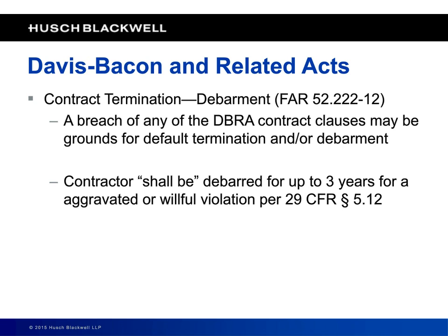Now, that got appealed to the Sixth Circuit Court of Appeals, and it reversed. It found that the damages were properly measured as the difference between, or at least the single damage figure, because as you know, under the False Claims Act, you're liable for treble damages, but it found that the single damage figure was the difference between the wages that FaceTech paid its employees and the Davis-Bacon Act wages, which turned out to be about $9,900. So that's a little bit of good news.